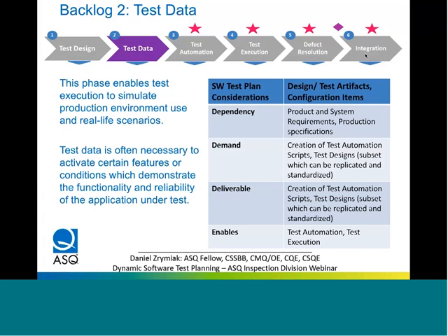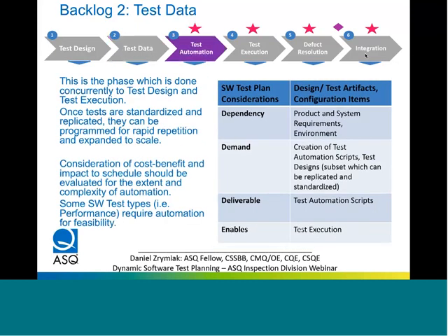And as well, if there's more test data needed than the test design originally anticipated, this is a way that you could respond back to the test design phase and pull, the same way that Kanban pulls the inventory. You can use the demand for a revised test design to pull back and draw more effort that way. So it's more dynamic.